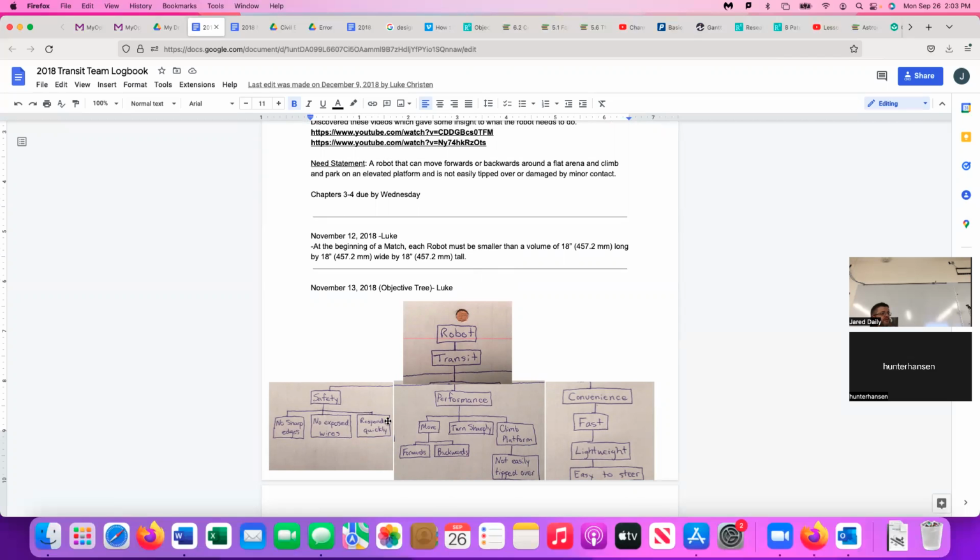And you could even say that one person in my group, I've got 2 people in my group, is going to research companies that have already done something similar, and another is going to research all the possible, I don't know, users that might use this or something like that. So we get information from them or something. And then that's just your research thing, and maybe you think that's going to take a week.